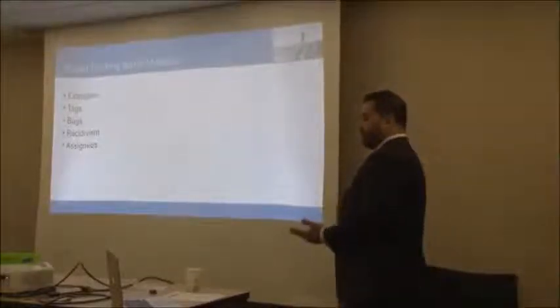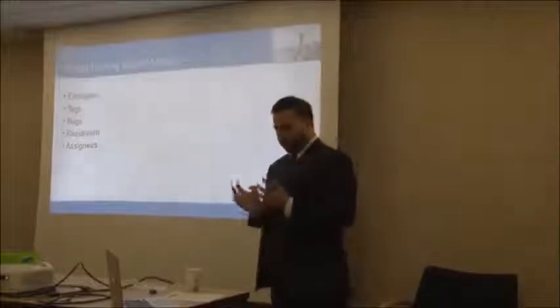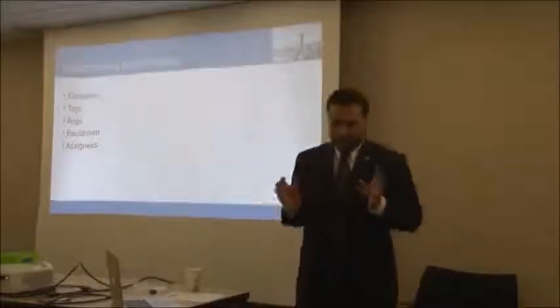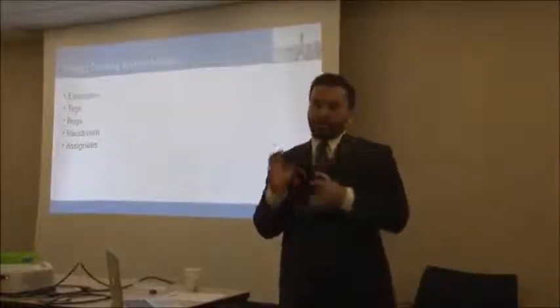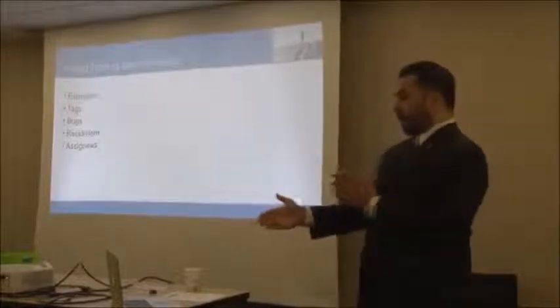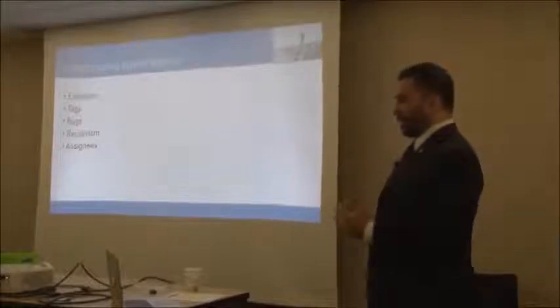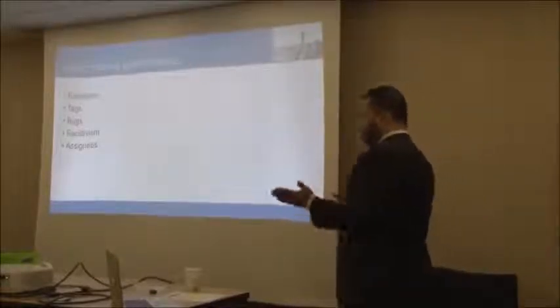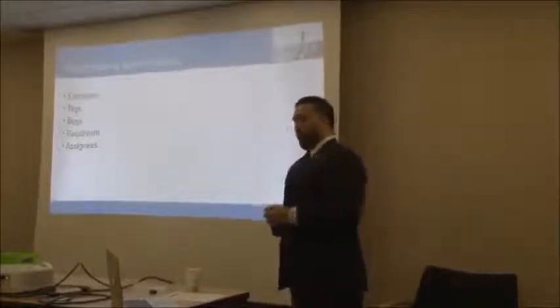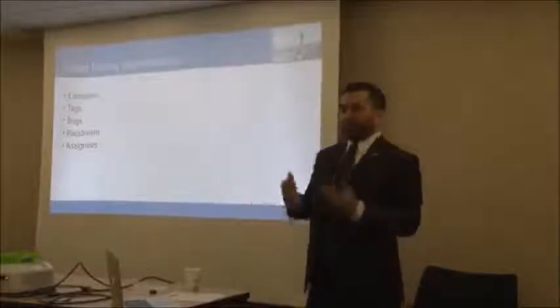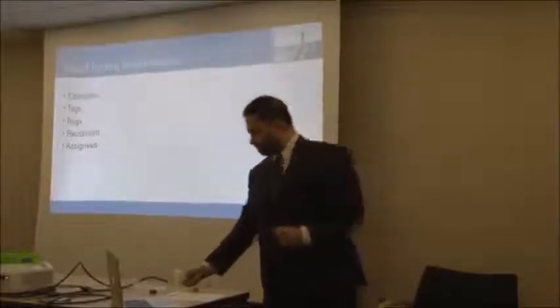And then who's been assigned what work. Now in Scrum in particular, you're told that the Scrum Master does not actually assign things. People go up and volunteer for the work they want to do. It's part of the self-organizing aspect. In Kanban, there is no such rule. So however the work is assigned, you want to know who's working on it.